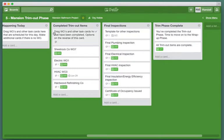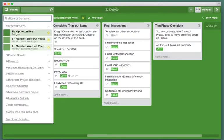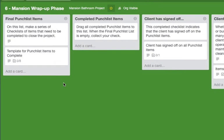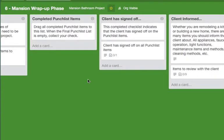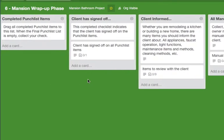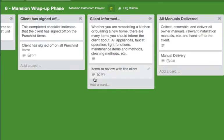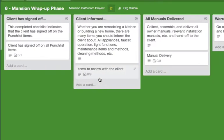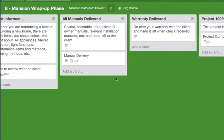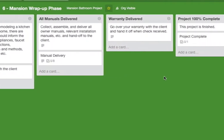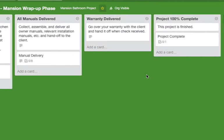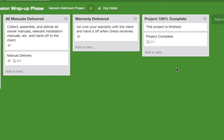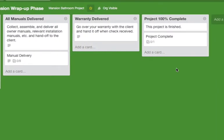So we'll move on to the wrap-up board. In this board called the wrap-up phase we have final punch list items, completed punch list items, the client has signed off, client informed, all manuals delivered, the warranties delivered, and the project is 100% complete.